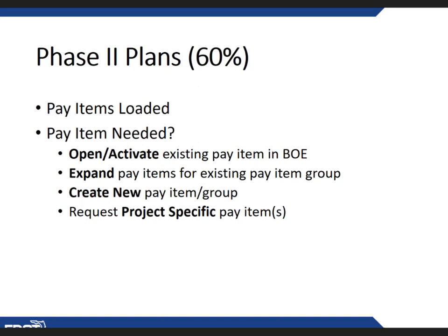Now, some pay items can be opened in just a few minutes. That's not a problem. However, pay items not covered by standard specifications may take longer. And this is very important. Make sure that your schedule allows time for these reviews. So you will have to load pay items.